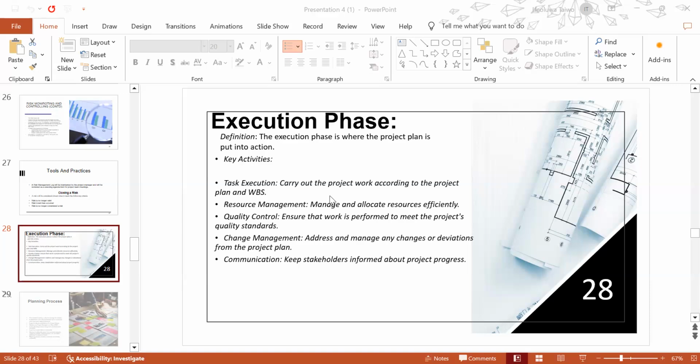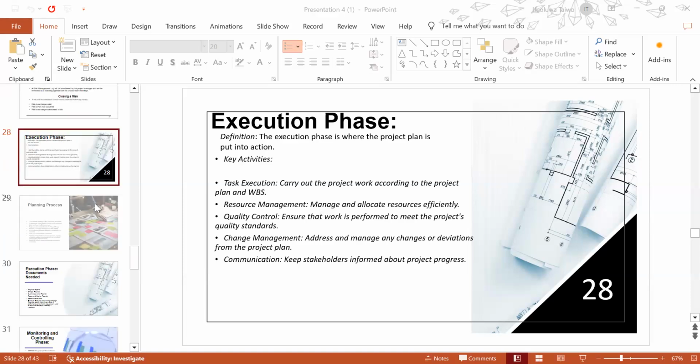And like I was saying last week, changes will always occur. So it's your job as a project manager to always make sure that whatever change occurs, you get the right and necessary approval before you start implementing. If it would affect your project schedule, project cost or project resources, you want to state all of that in your change management plan, and then share that information with the project sponsor, with leadership or with management, as the case may be.